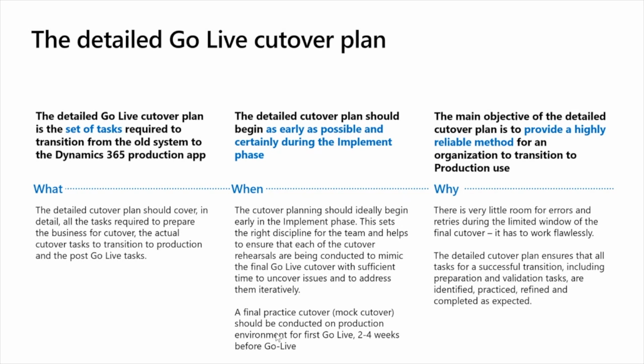The rule really you should be going by is, I don't want to be doing anything at the final go live cutover that I have not practiced and got right before. The risk otherwise is too high.